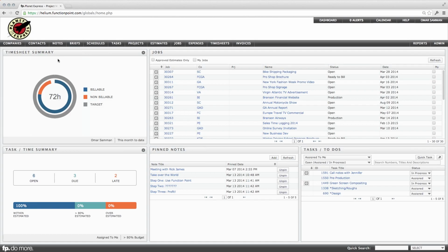And non-billable is a little tricky. So keep in mind, non-billable work can either be defined as a service or an internal service that your staff would track time to, but it has a $0 rate. So it's considered non-billable. But there could be situations where, and I'm not trying to confuse anyone here, the job itself is billable, but the service is non-billable. That work is considered non-billable.